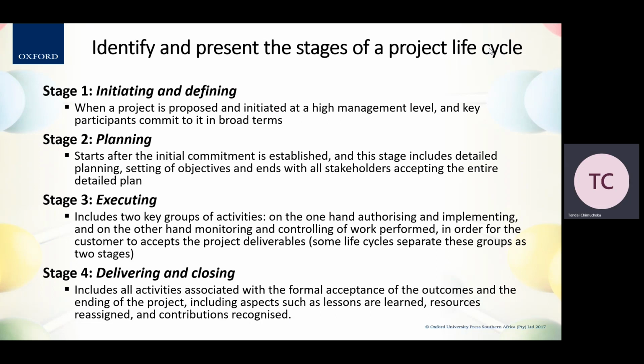So after initiating and defining of a project, the next step would then be to plan. And this starts after the initial commitment is established. This stage includes detailed planning, setting of objectives and ends with all stakeholders accepting the entire detailed plans. Remember, in planning, there is also the setting of objectives and there is also a setting of targets. So this process of planning ends with all stakeholders accepting the entire detailed plan, accepting those objectives that have been set, those targets that have been set.